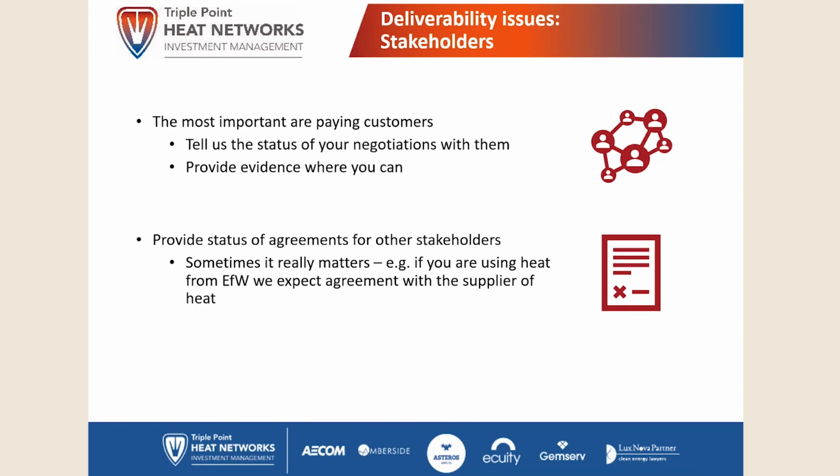For most of the other stakeholders, it will be to do with energy supply, and also there's things like planning and permissions to dig in roads and other issues. Heat pumps may well require EA approvals, and again, at commercialization stage, we want to see where you are in the discussions.